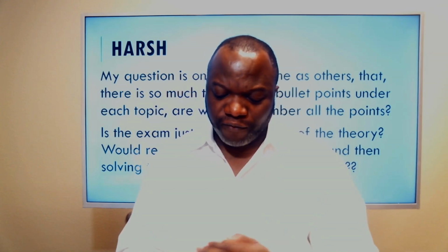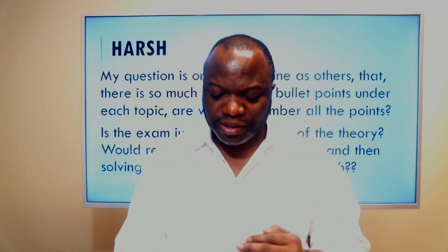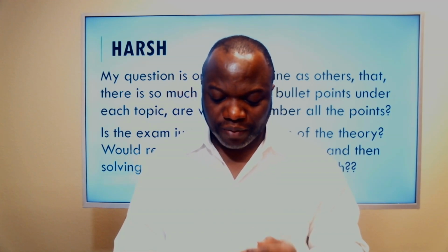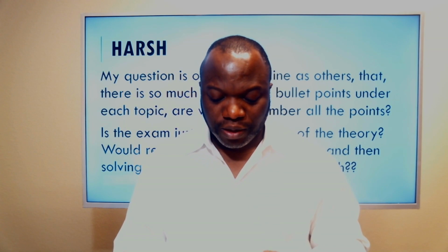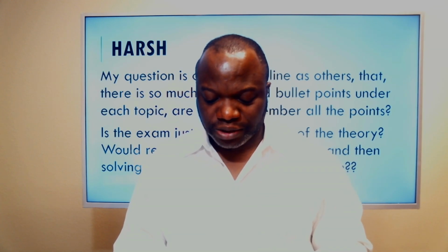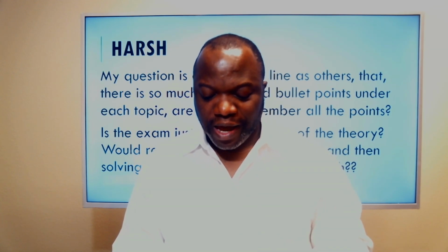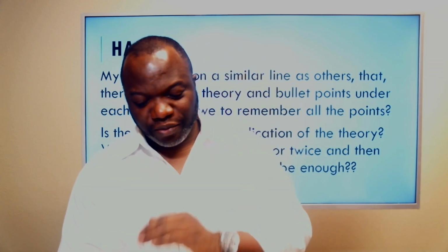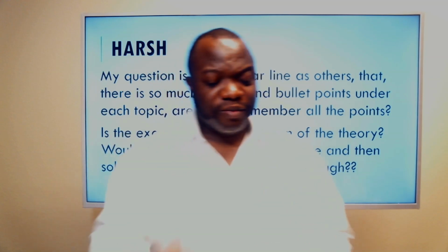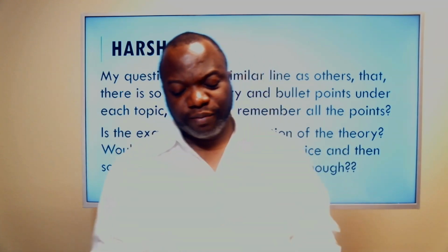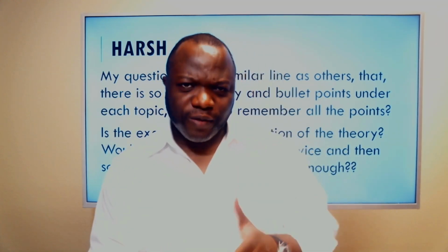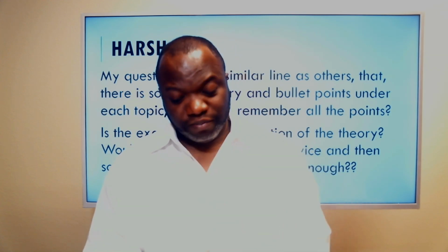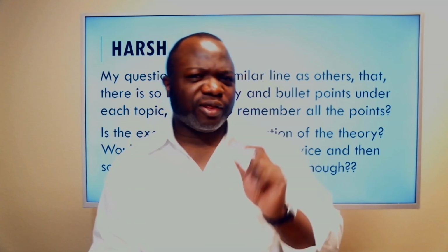Then, if you go about 4 lines down, it says, a project manager is identified and assigned as early in the project as is feasible, preferably while the project charter is being developed, and always prior to the start of planning. So another question would be, when is the project manager assigned? Always prior to planning, sometimes prior to planning? It's always. So there are little things in the guide.